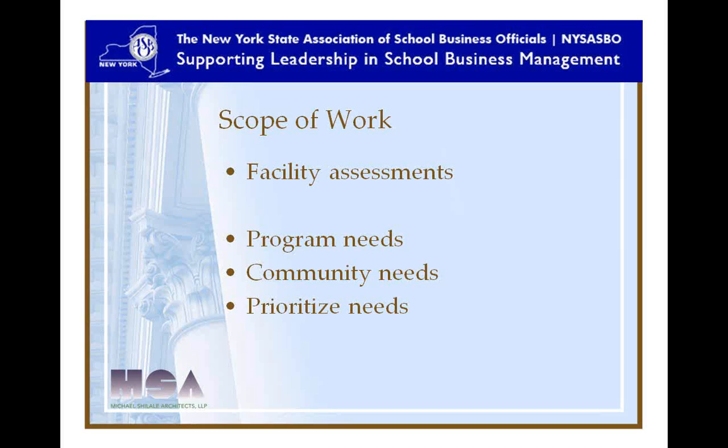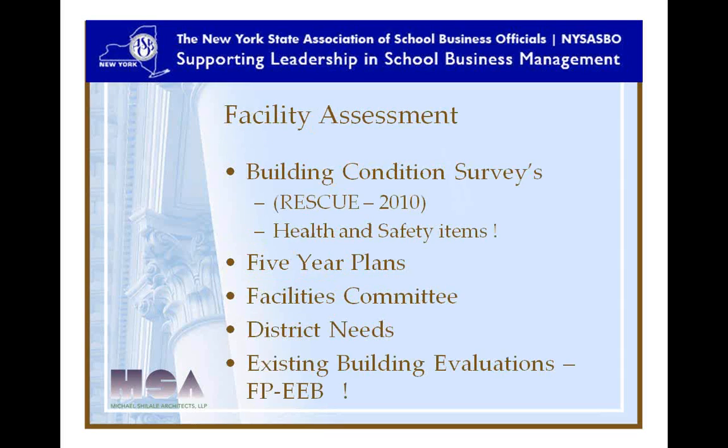The only ones that process can pay for, however, are capital improvements that save energy, and not all of them will. So you want to try to get as many improvements underneath an energy performance contract initially, and then use any Excel money you may have or other sources of dollars to finance the things that can't be financed in more creative ways. So that's something we could chat about a little later as well.